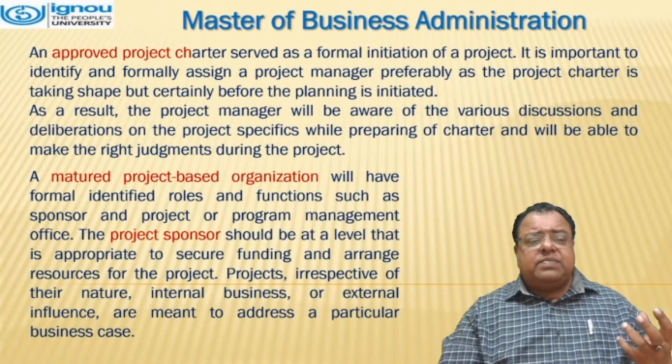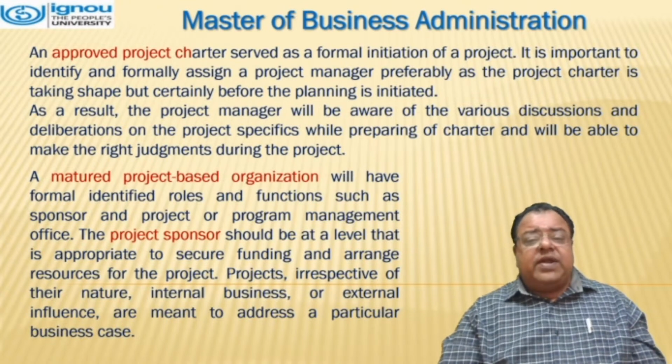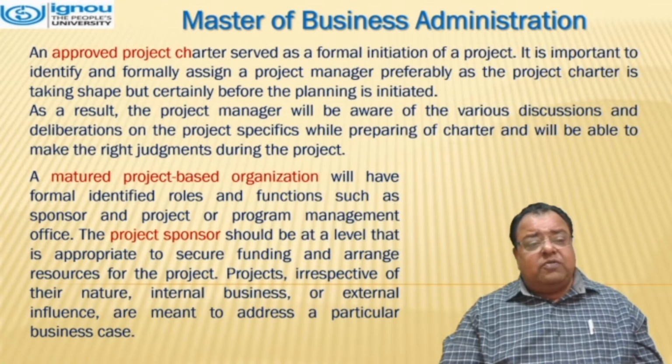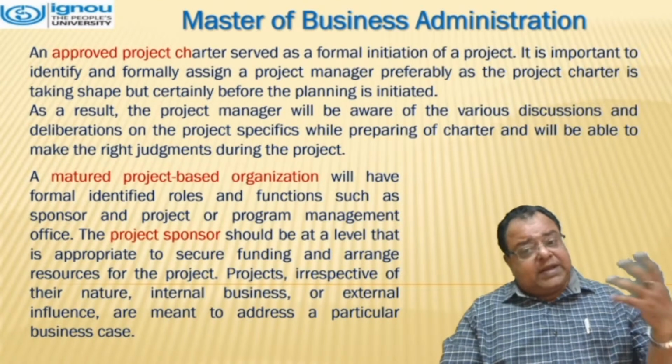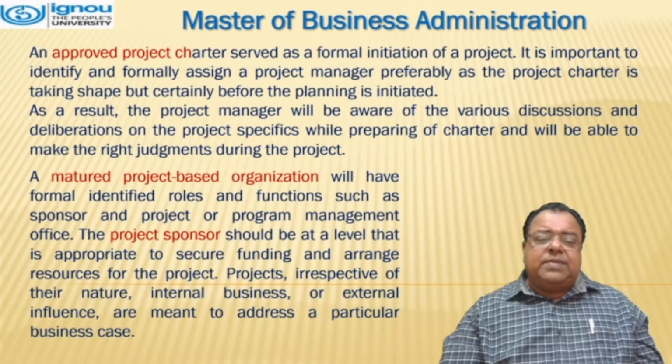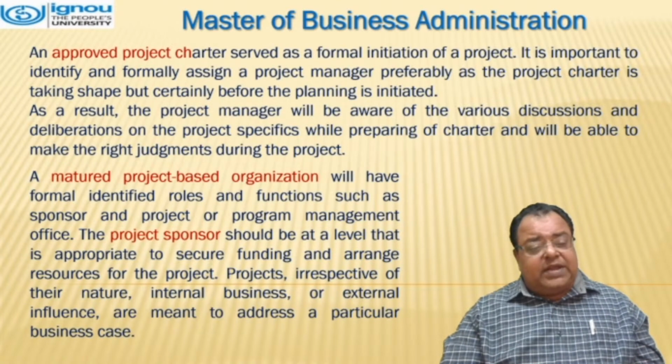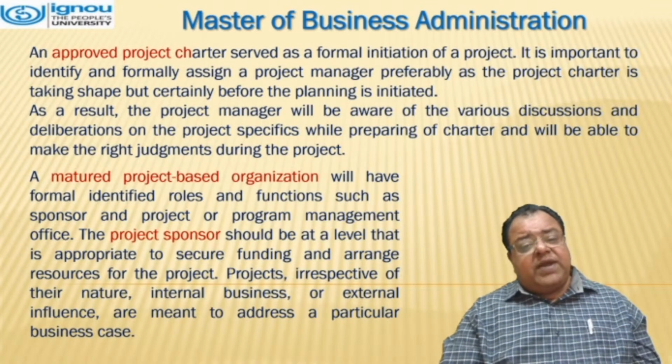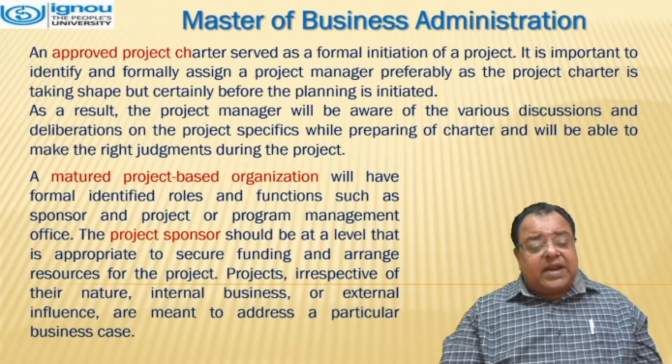An approved project charter serves as a formal initiation of the project. It is important to identify and formally assign a project manager, preferably as the project charter is taking shape, but certainly before the planning is initiated. As a result, the project manager will be aware of the various discussions and deliberations on the project specifics while preparing the charter and will be able to make the right judgment